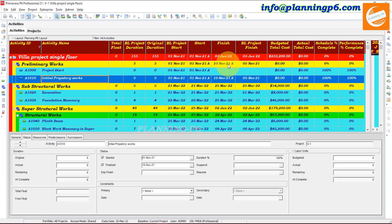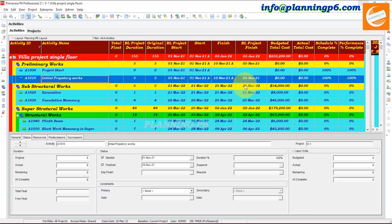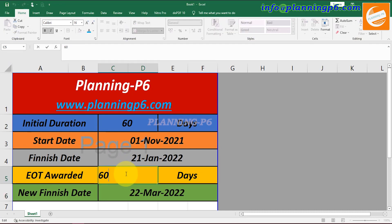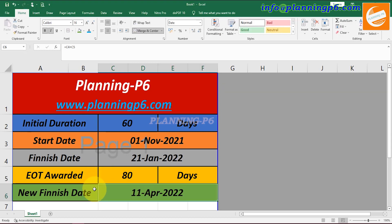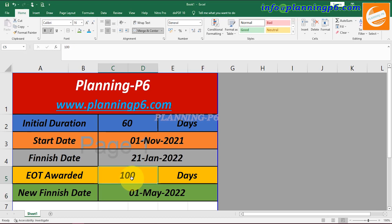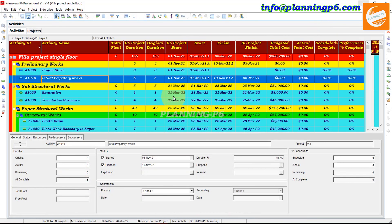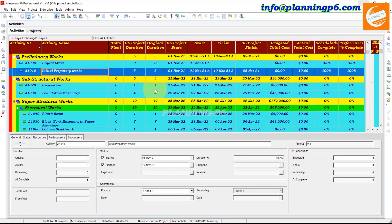Instead of 122 or 123 days, our project finish date is going to 3rd of June 2022, but we need to catch up to 22nd of March. If the EOT awarded is 80 days, you can focus on 11th of April. If the EOT awarded is 120 days, the new baseline date would be around 21st of May 2022. The second option is fast tracking, and we have to reduce our duration to catch the project.